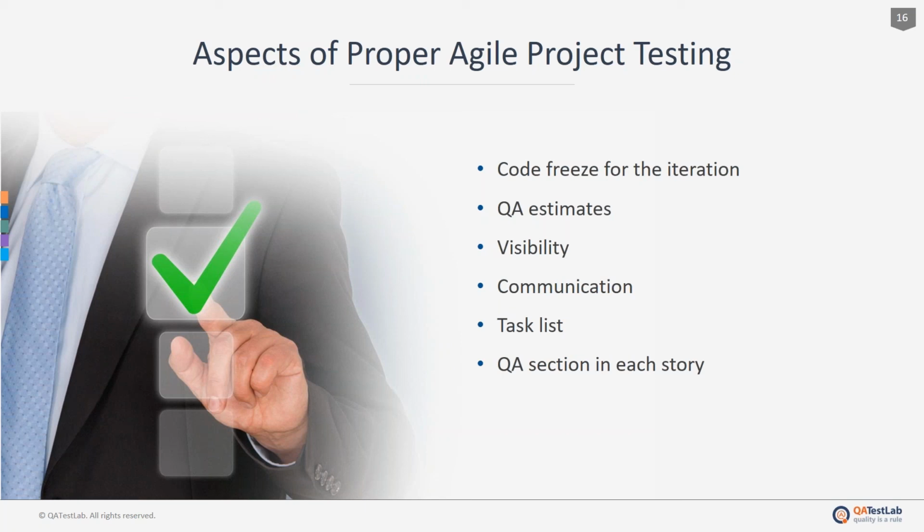Next in this regard, any change in a story. Any change in a story should be communicated to at least one QA team member by the PM, business analyst, and developer. This QA team member will then coordinate with the QA working on the story and ensure all testing related to the story is adjusted appropriately.